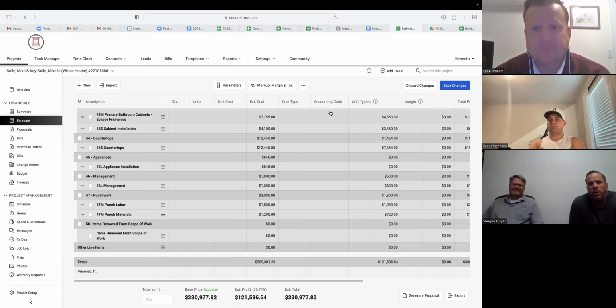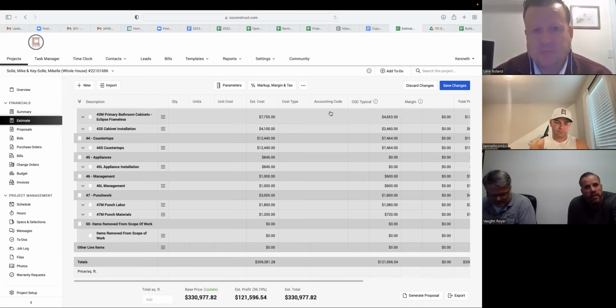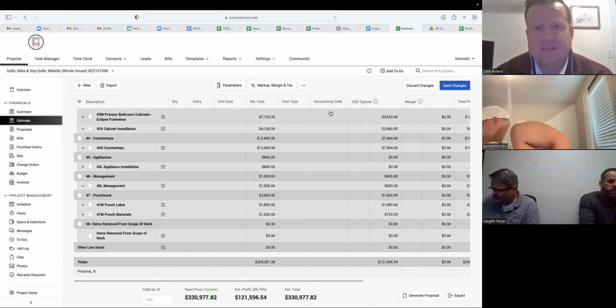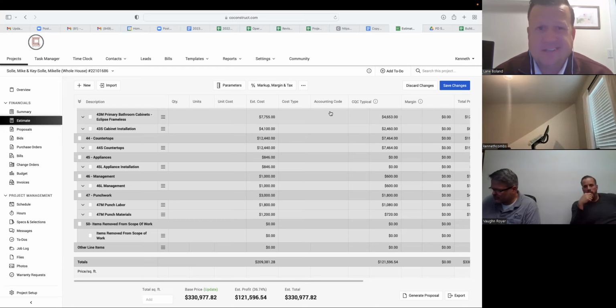Yeah. So I think Vaughn was still fishing for one piece of the 50% number. Is there actually software used to build an estimate? Here at BMW Builders, they've been using Clear Estimates, which pulls on the NAHB's survey of labor costs, and then they use a couple different regression analyses. I would never sell a job based off of the numbers they give us, but it's like, I don't know, 80% accurate.